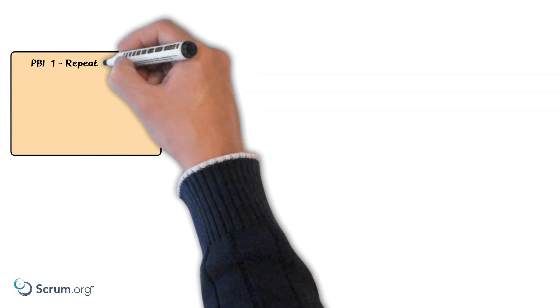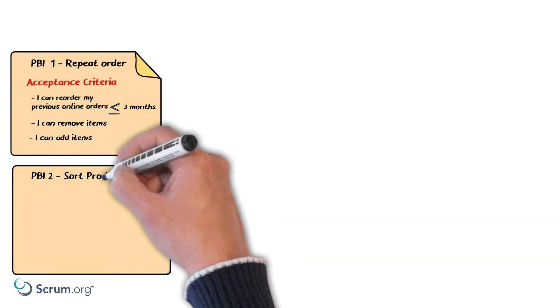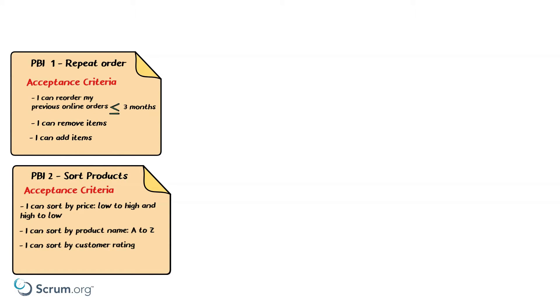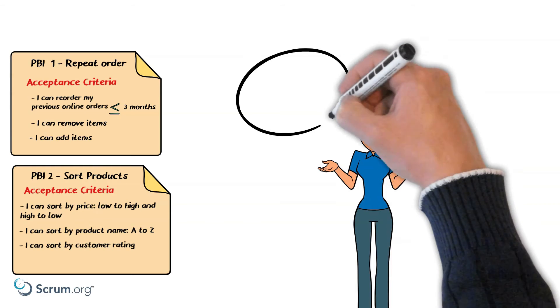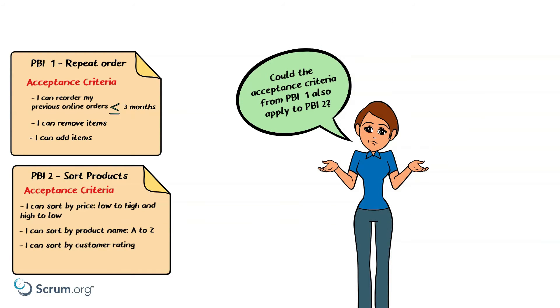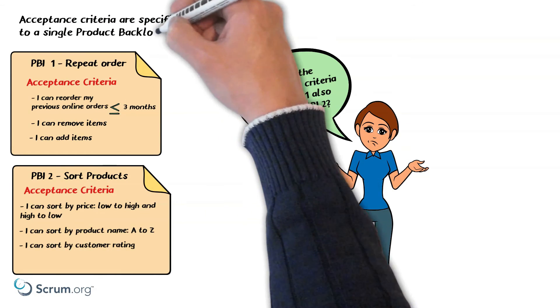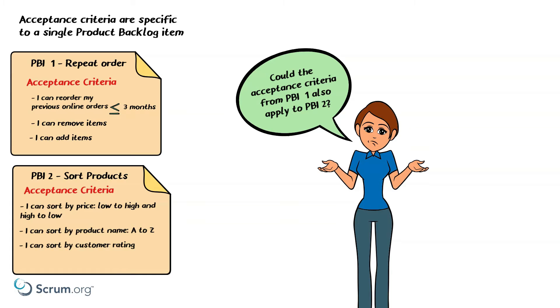First, the team wants to explore the confusion they have about acceptance criteria versus the definition of done. Robin shows two example product backlog items: one for a feature that allows customers to place repeat orders on the website, and another that enables customers to sort products on a results page. She asks everyone to compare the acceptance criteria of both items. The team quickly establishes that acceptance criteria are specific to a single product backlog item.